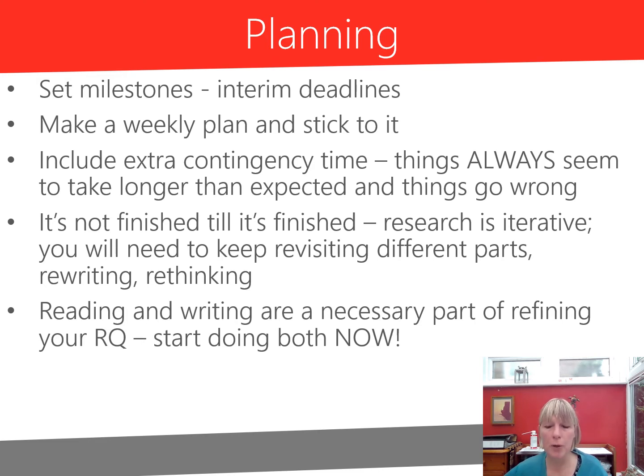So once you've figured out the limitations of what you can do in your research, and once you've decided what you're going to research and how you're going to research it, you need to set your milestones. Milestones are interim deadlines that you set along your research journey. And these are deadlines for tasks that you need to complete in order to finish your whole project in time for your final deadline. So those might be tasks like writing your literature review, finishing your data collection, and so on and so forth. It's really important to set these milestones and to stick to them if you want to finish your project on time.